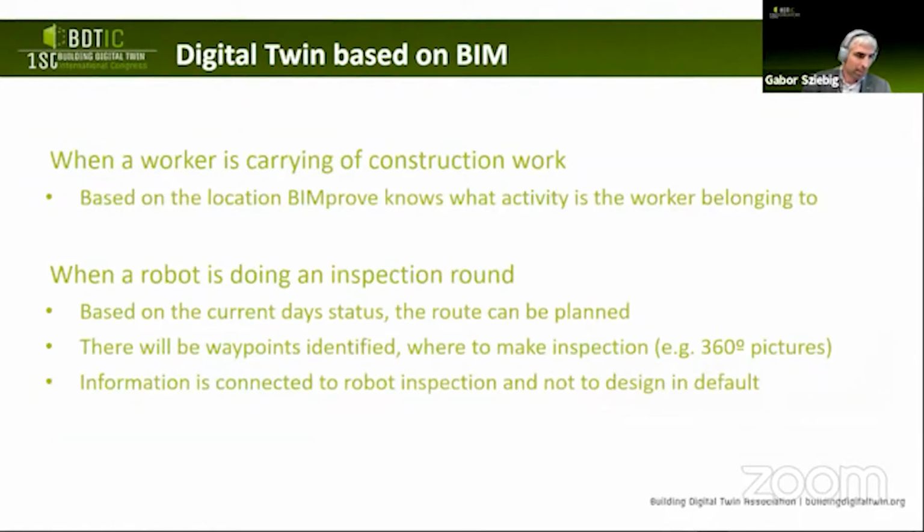In addition to that, we also follow up where the workers are on the construction site, based on their location zone-wise, not precisely, to keep the privacy of the worker. So we are able to follow up on whether work that needed to be done was actually done or not.